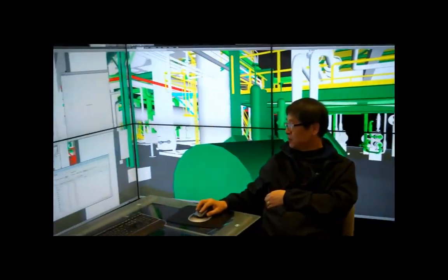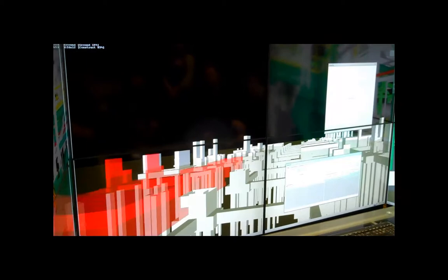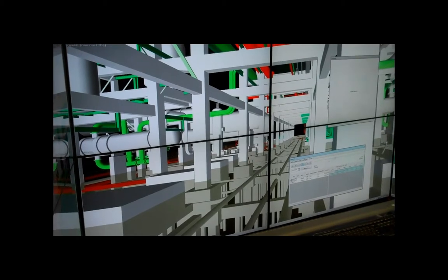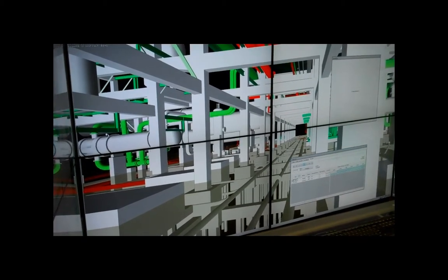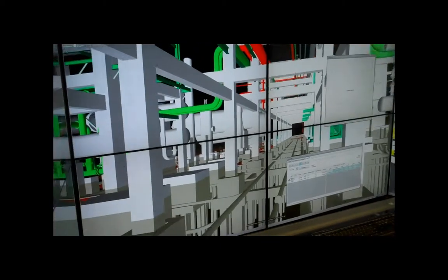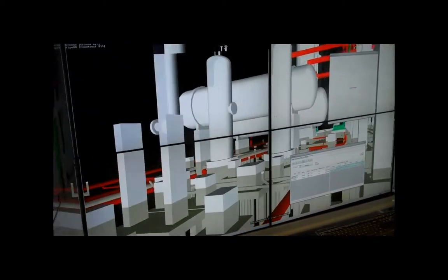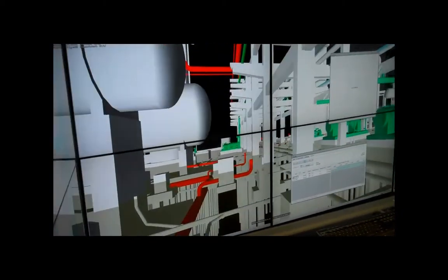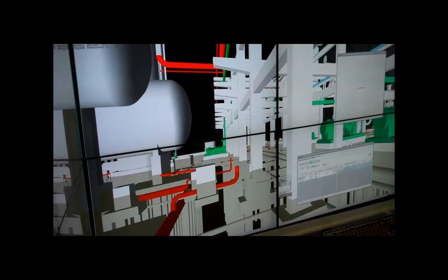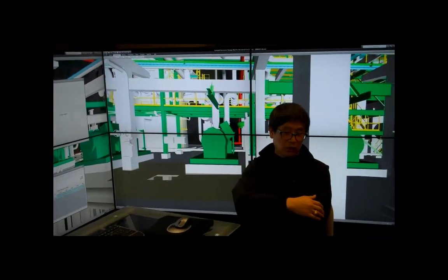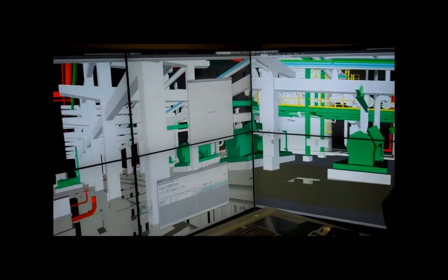So I'll show you how this plant can be built from day one. From here, it can be built like this. And obviously you can stop your time right here, and then you can walk around it. And then try to talk about how you want to, for example, use your mobile crane to put the pipe spools on top of that rack. So that's something that we can talk about while we are working on the pre-construction coordination meetings with the subs.